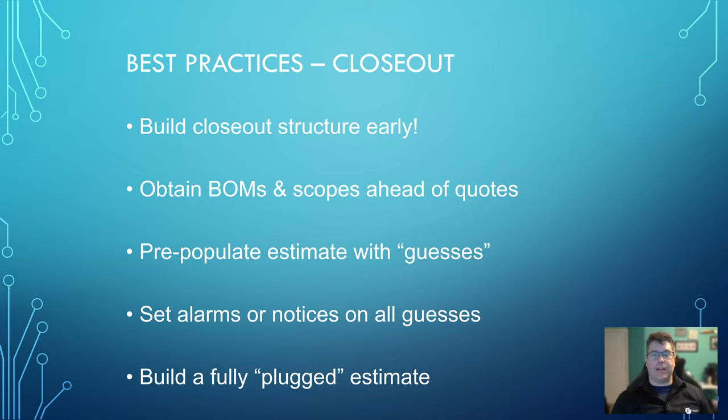And so this is where all of our talk about AI and the time savings and all of that really comes into play here, because it shifts the balance of what you're working on in the estimate. Earlier on in my career, I ran some data analytics on the estimating process, and I discovered in our mechanical electrical estimates, we would spend 80 to 90% of the time on those bids counting widgets. Those widgets, by and large, only contributed 25 to 30% of the final value of the bid. They all had to be counted, but we wasted a disproportionate amount of time on the lowest value parts of the estimate.